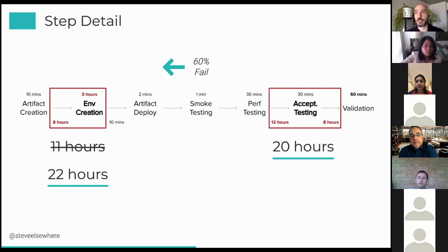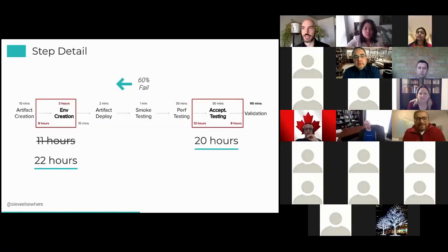So that's an opportunity for us to improve the flow by focusing on where the complete and accurate is low. But that's a typical measurement for that. And I've left out that level of detail here just for illustration purposes, but that's something that we can layer on if we have quality issues, if we're concerned about rework, we can look at percent complete and accurate. And that's where you're going to get that number from.